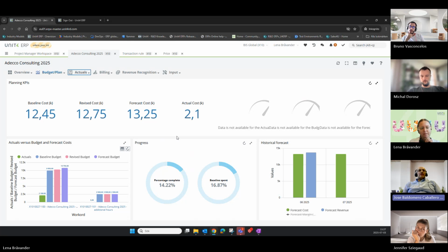You are 14% done because you have this cost. Exactly. But it does not mean that 14% of the task has been done, or 14% of the deliveries has been achieved. No, it's not the same. So we don't have this anymore.